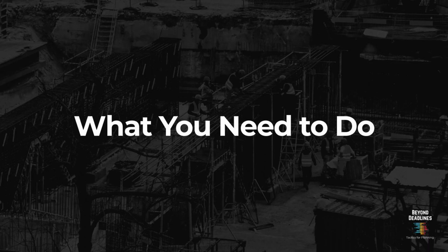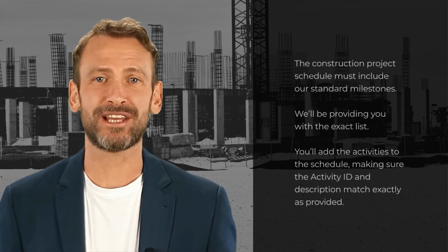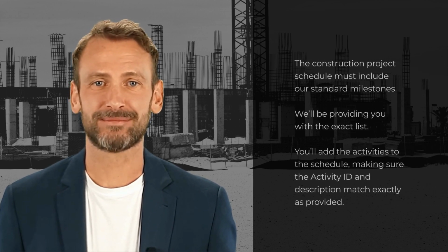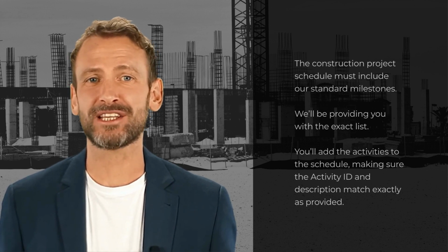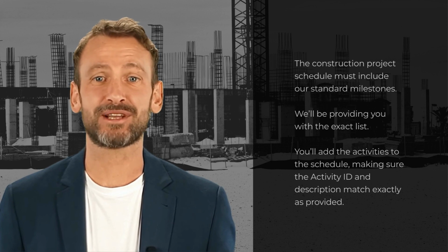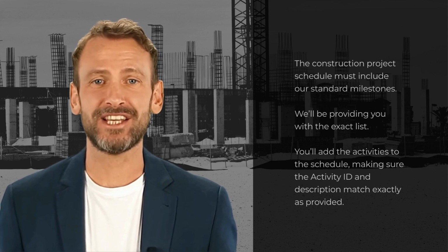Let's cover exactly what you need to do to be successful. The construction project schedule must include our standardized milestones. We'll provide you with the exact list. You'll add the activities to the schedule, making sure the activity ID and description match exactly as provided. It's as easy as that.